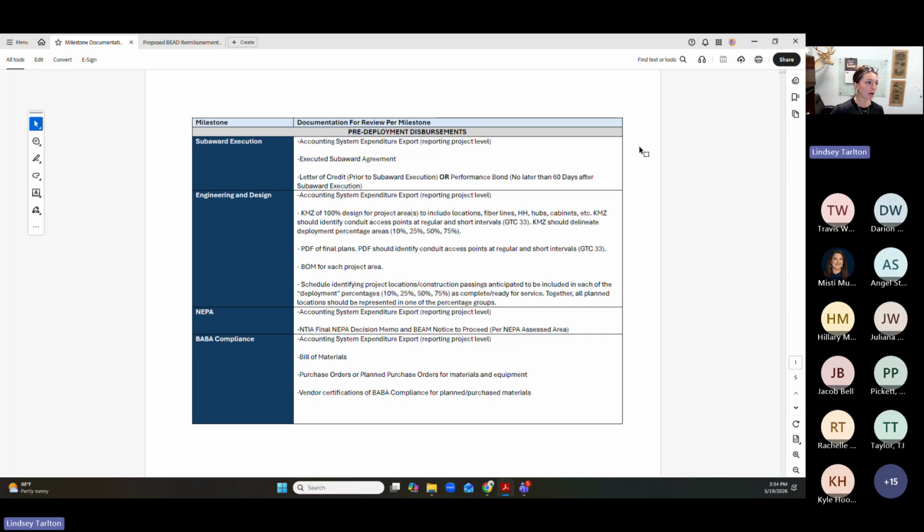Last week we did talk about subaward execution, since that one will happen fairly quickly after you actually execute subawards with the state of Mississippi BEAM office. What will be required for that one is the executed subaward agreement itself, and then, like we talked about last week, either your letter of credit, which would be needed prior to the execution of that agreement, or your performance bond, which is no later than 60 days after subaward execution. You would need both of those things to substantiate completion of that milestone.